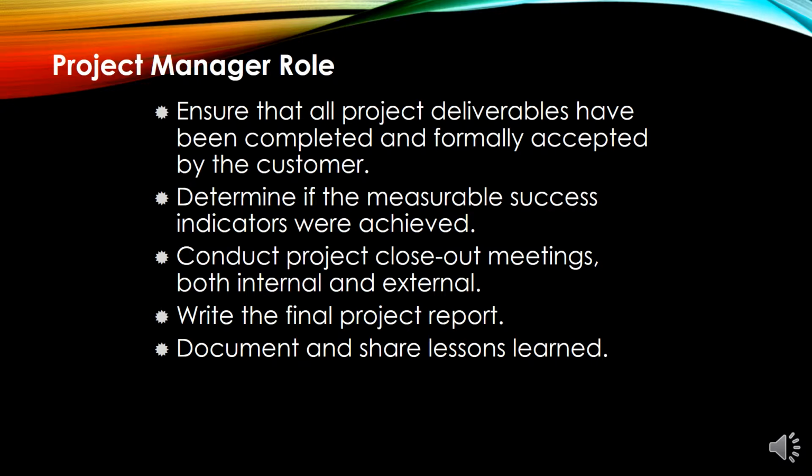The role of the project manager is basically to ensure that all the project deliverables have been completed and formally accepted by the customer. He also wants to determine if the measurable success indicators were achieved and to conduct project closeout meetings, both internal and external. Internal meaning with your immediate team that you have assembled before you go over the punch list and things of that sort. And external would be your customers, your stakeholders, and end users, things of that nature.